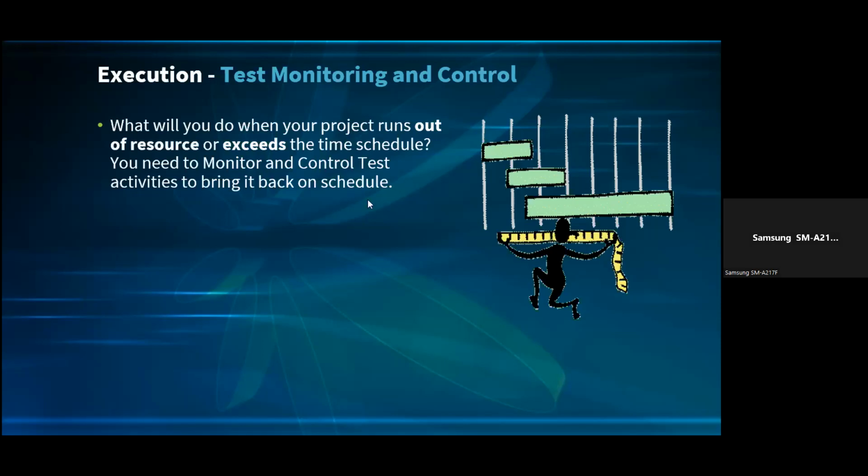Well, I'm going to look for resources B and C. They will have 50%, they can join. Because if the workload is much, you won't be able to meet the deadline, and if you can't meet the deadline, it's going to move the project plan further.